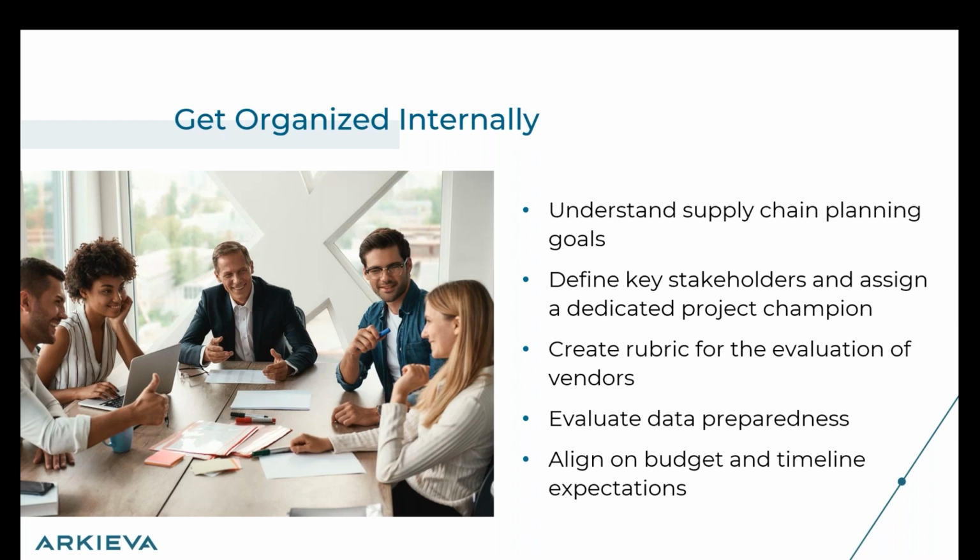It's also important to look at your data preparedness. These projects, whenever you do them, once you've done the selection, require a lot of data. So you may want to evaluate your data preparedness, because it'll be bad if you go through the selection and go to start the project only to learn that there is no data, or not good enough data. So garbage in, garbage out can apply. And then, of course, you have to know internally what your budget expectations are. That one is easy. Everyone can understand that one.